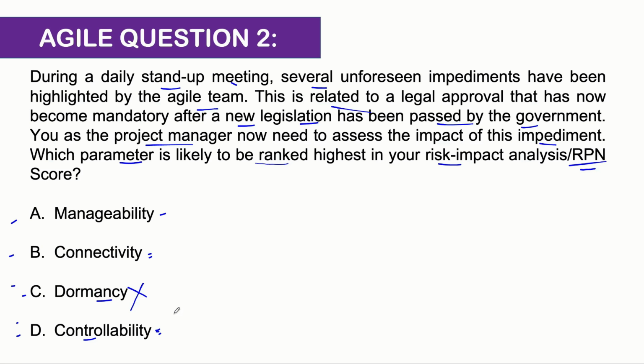Now, if you have attended my Lighthall sessions in my first batch, we have talked about this concept of data gathering before problem solving. Whenever a problem occurs, guys, and this is one of the frameworks that we'll talk more about if you are attending my second batch of the Lighthall session, effectively, whenever a risk or an issue is occurring in your project, you should not jump into solving the problem without proper data gathering and data analysis. That's very important, guys. The first step of solving any problem is data gathering and impact analysis.